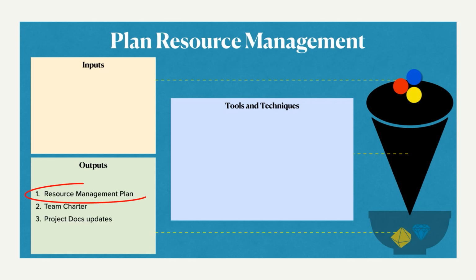We have the resource management plan created. So also one of the important points of the final project management plan. So what information does it contain? Identification of the resources, how we have acquired the resources, what are the roles and responsibilities of each of these resources. All this is mentioned here. Now it could also include a training plan, rewards and recognition, history. All these things can happen.